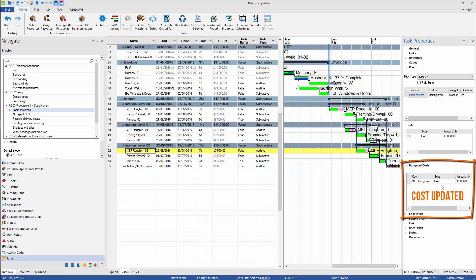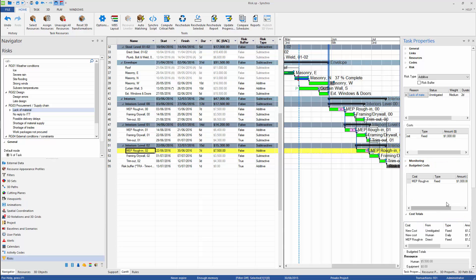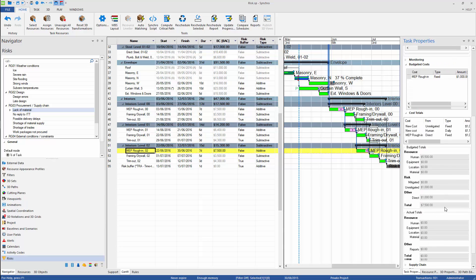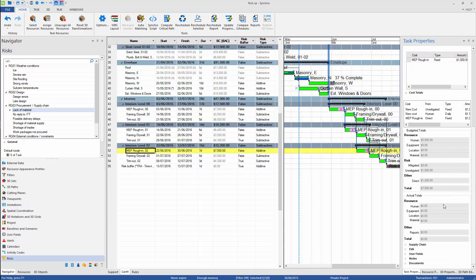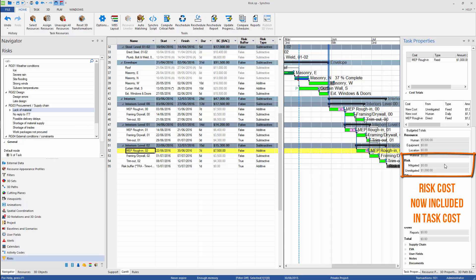The risk cost is a new category of cost added to the task. We can find all added costs in the Task Properties window.